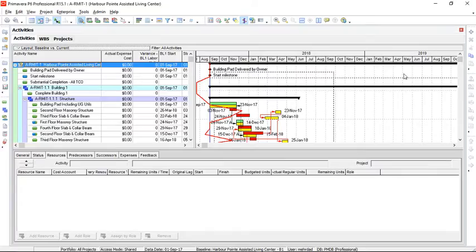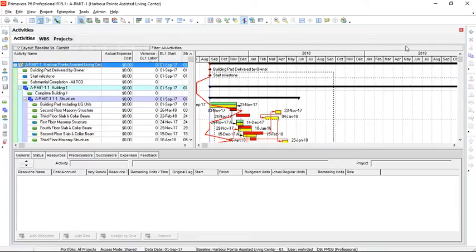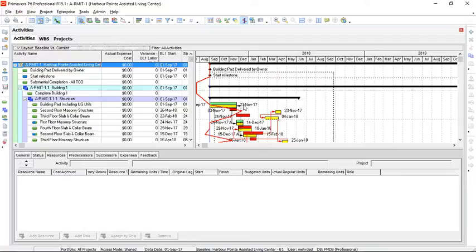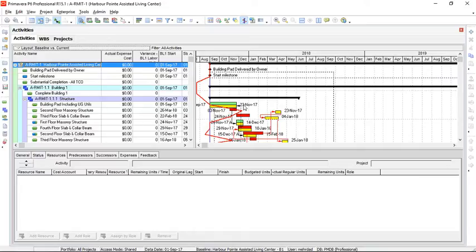Back to our Primavera file. As you can see, the baseline is shown in yellow bars, and we talked about maintaining and assigning baseline in previous videos. So this is a tracking Gantt chart that we are looking at. The data date has been set and the project has been scheduled by pressing F9. Now we are ready to evaluate the performance of the project conducting earned value analysis.